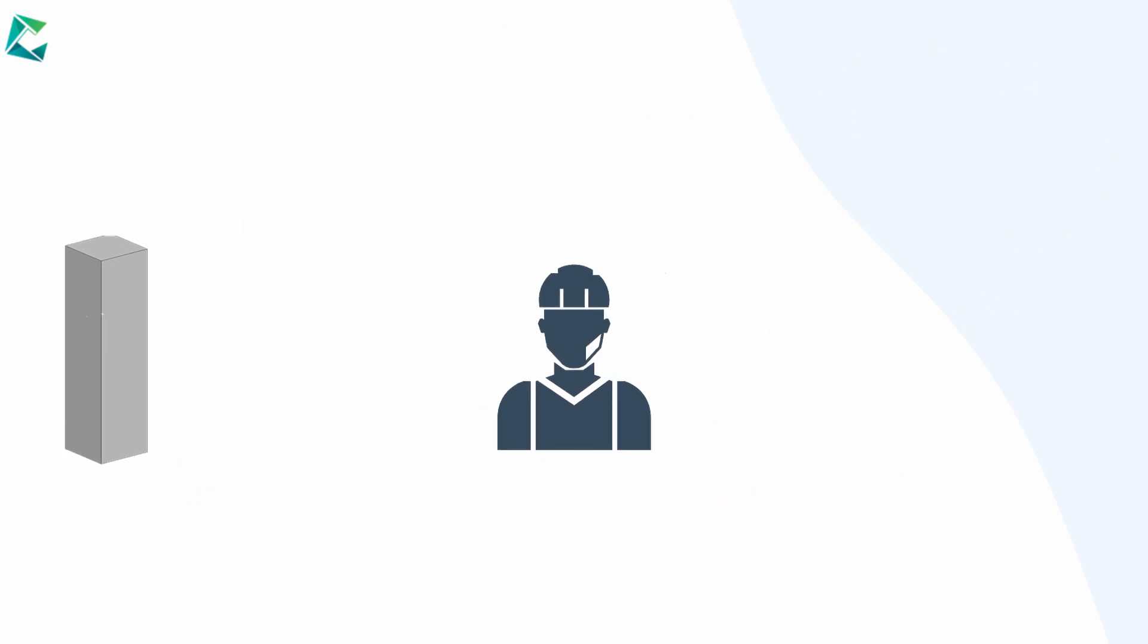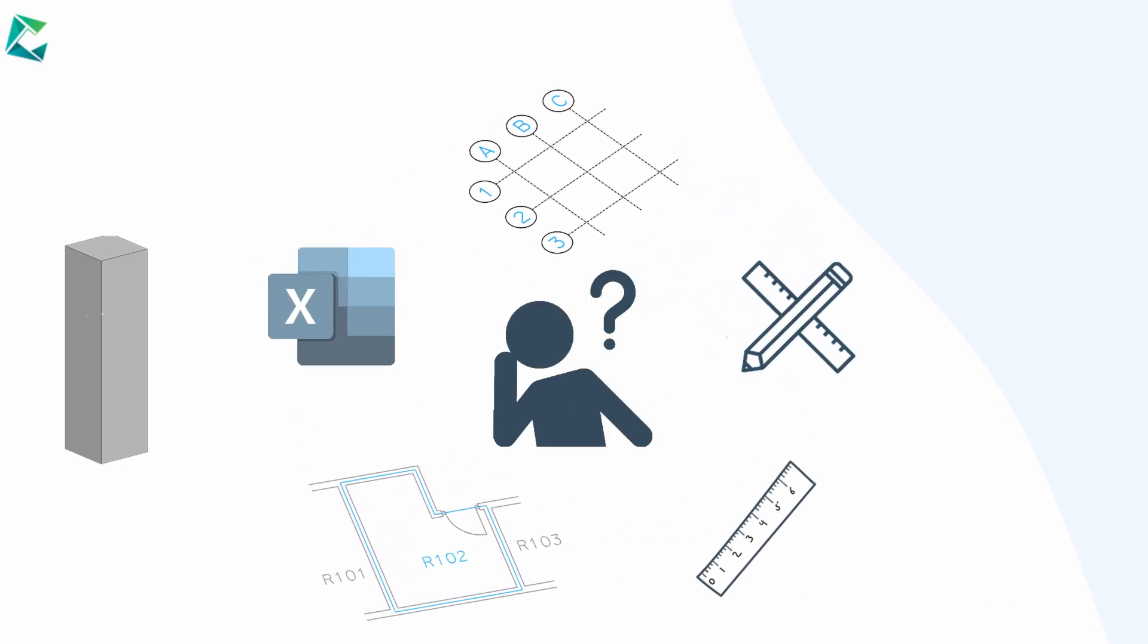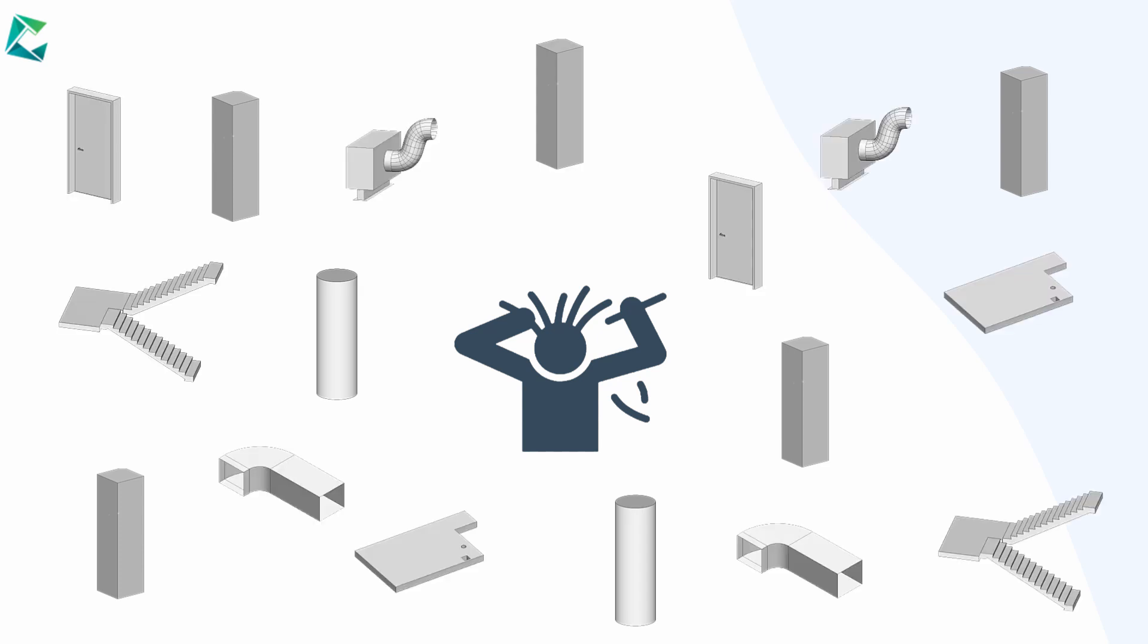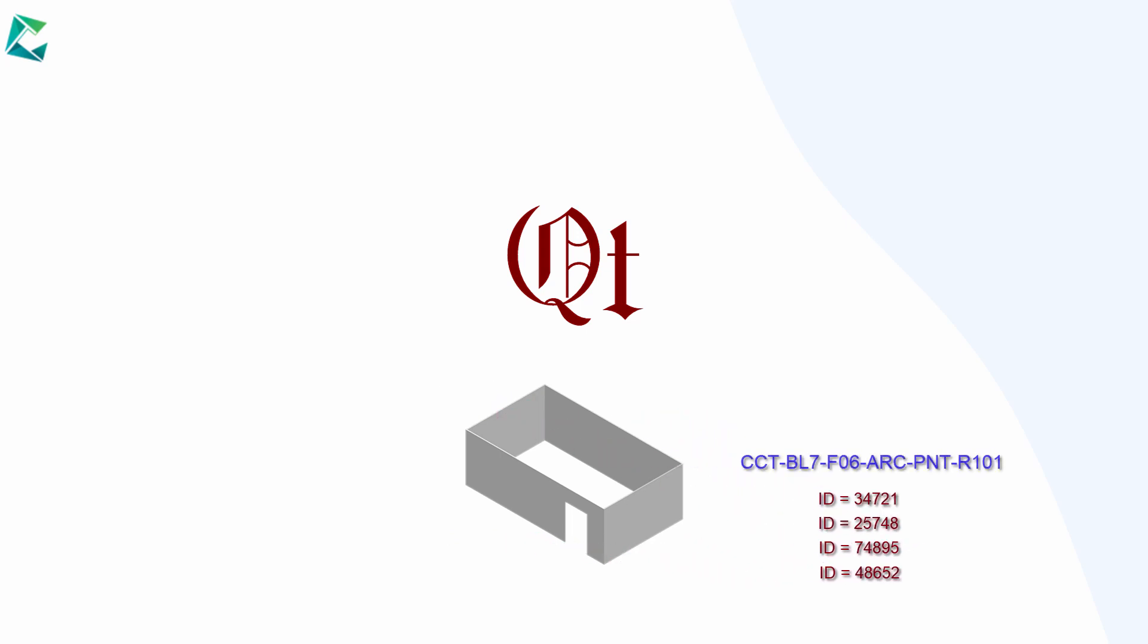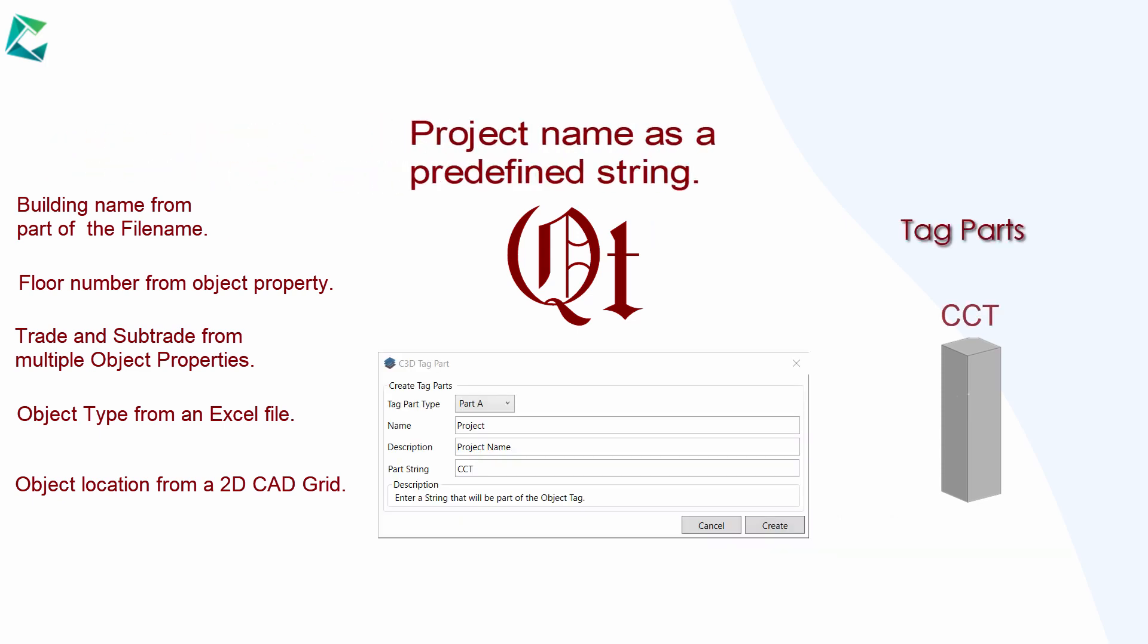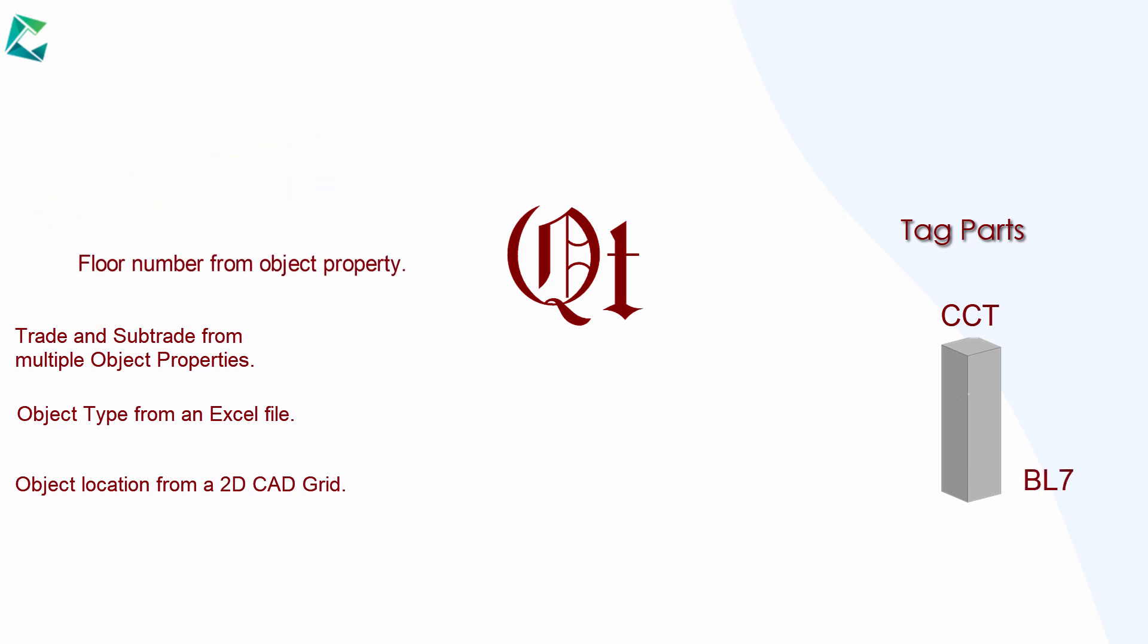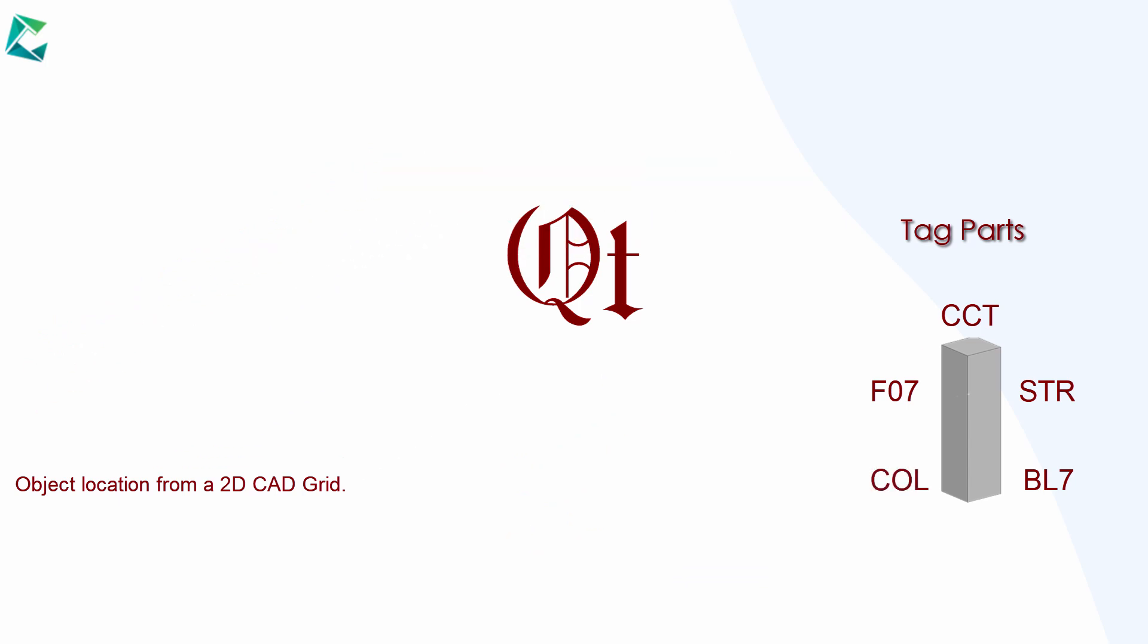This information should be manually collected from various external sources such as project grids, 2D drawings, or look-up tables. This can be unmanageable when projects have thousands of objects belonging to many disciplines. BIM Quantifier object tagging module provides a sustainable solution for generating unique tags for each construction object, not just graphical objects. BIM Quantifier tagging features state-of-the-art techniques that provide various methods to collect needed information intelligently from various sources and generate unique construction tags. BIM Quantifier collects needed information for tagging and allows the user to arrange it so the final tag can be generated as per the project need.